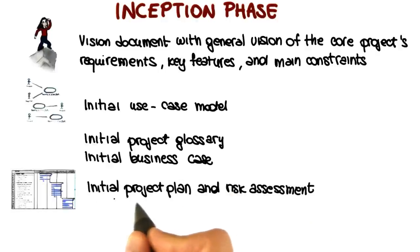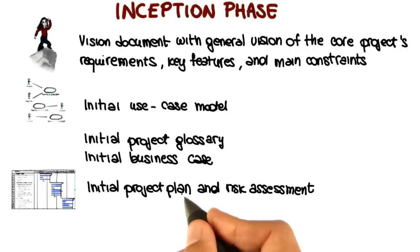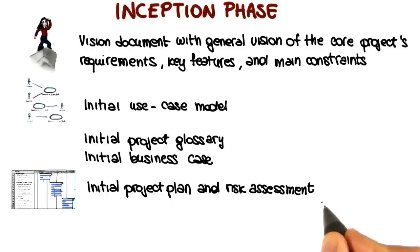Yet another deliverable for the inception phase is the initial project plan, which shows the phases, iterations, roles of the participants, schedule, and initial estimates. In addition, the inception phase also produces a risk assessment document, which describes the main risks and countermeasures for these risks.